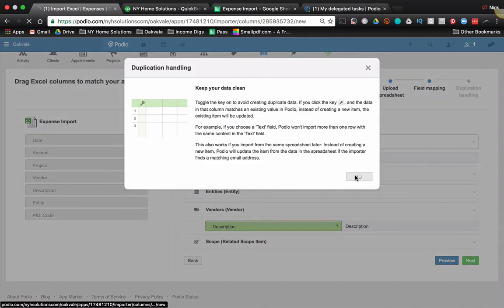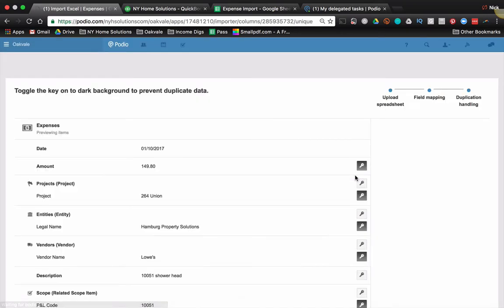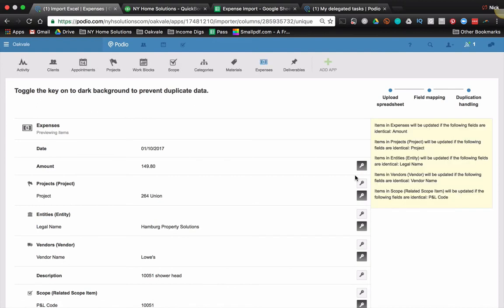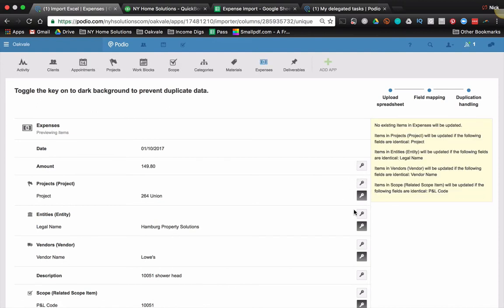So we click next. Now the next part is very, very important. What we have to do is we have to set primary keys for all of those relationship fields. When the key is darkened, it means that if it recognizes an identical item that already exists in Podio, it won't create a new one. It will just reference the existing one. So for example, 264 Union, we saw that that is a project that already exists.